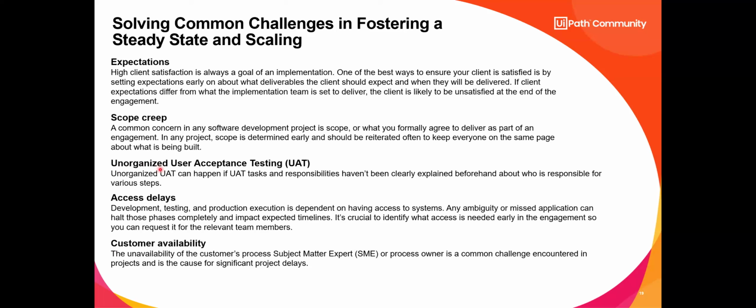Scope creep. That's where we promise to deliver an engagement, and this could involve what we call technical debt as well. We determine scope back when our business analysts and our solution architects are way back in the design phase. We're talking about scope, right? We may have to break scope and say, okay, that's going to have to be something for something else. And we manage scope during that build using change control processes, the standard, normal, and emergency changes.